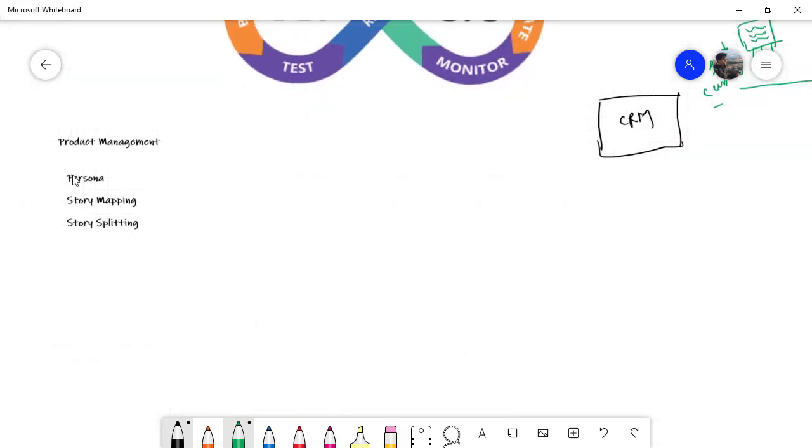So you're going to identify if the work that you are discussing can be delivered in a considerable amount of time. And okay, once you have split your bigger stories, you actually define a user story. Now, a user story is an English-like sentence which is generally going to have this model: as a, and then you have some empty space; I want to, and then you have some empty space; and then so that, right, and then some blanks.